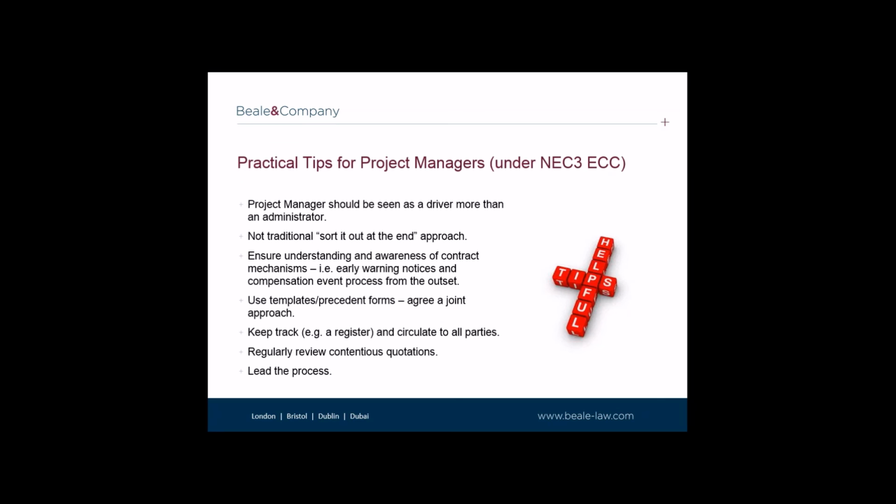It may also be helpful to use templates or precedent forms and to agree a joint approach in this regard in order to smooth the process and aid the parties. What does that mean? Well, a suite of standard form contract notices, perhaps together with a communications protocol, which can be used by the parties, we found to be invaluable for clients and extremely useful in delivering clarity and consistency between the parties throughout the contract.